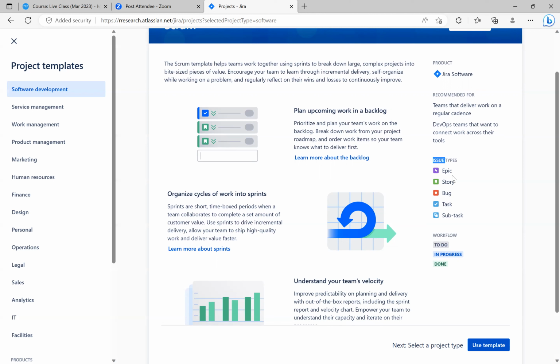So say we're developing something for different departments, and we want to do one department at a time. We can make departments our epic and put all the stories for that department under that epic. So we're saying these stories are related because they belong to a particular department.